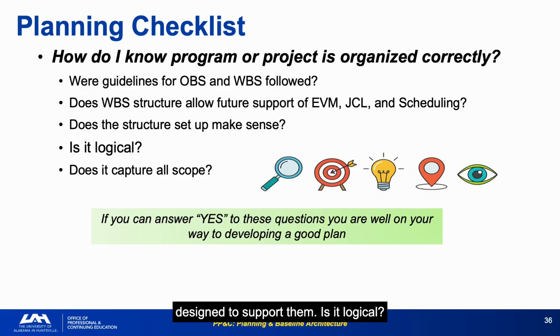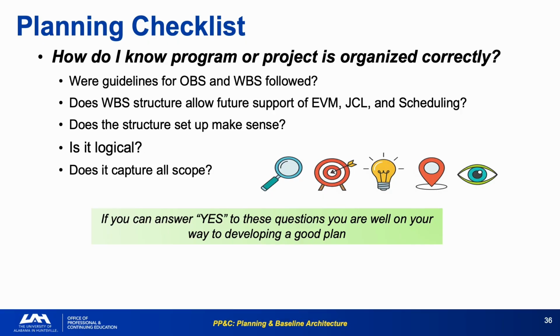Is it logical? Does it capture all scope? These are deceptively simple questions. The answer requires walking the WBS element by element against the SOW and verifying every shall statement is captured somewhere. Answering yes to all 6 questions is not the end of the assessment. It is the starting point. A WBS that is logical, complete, and structured correctly is a necessary but not sufficient condition for a credible plan.